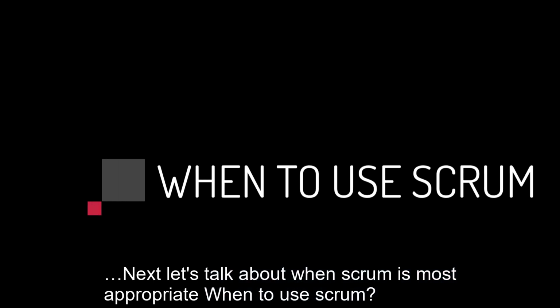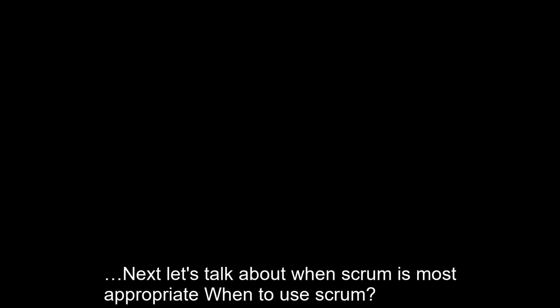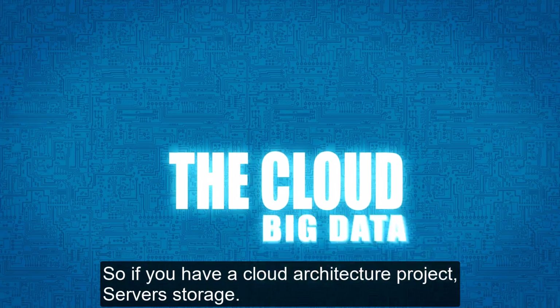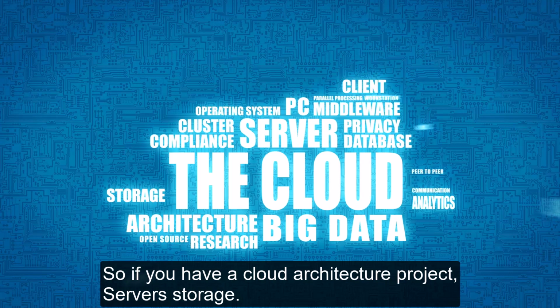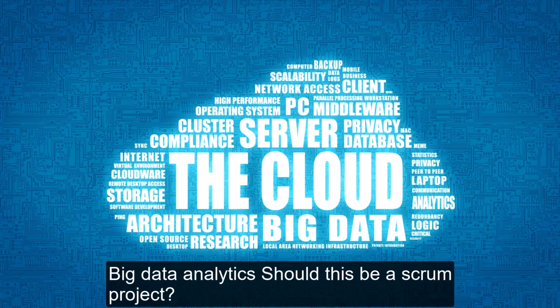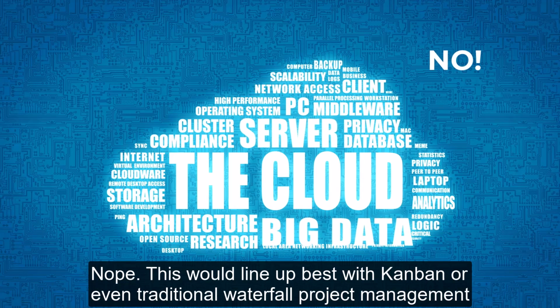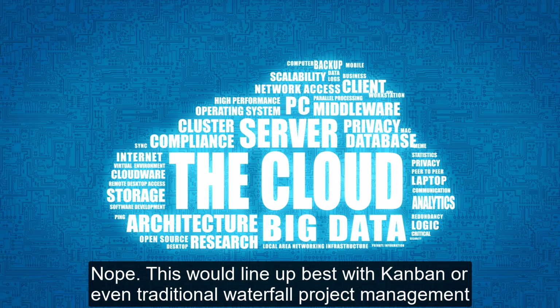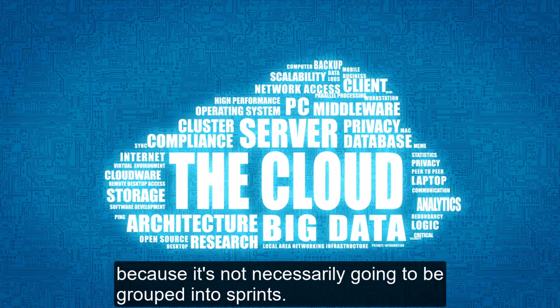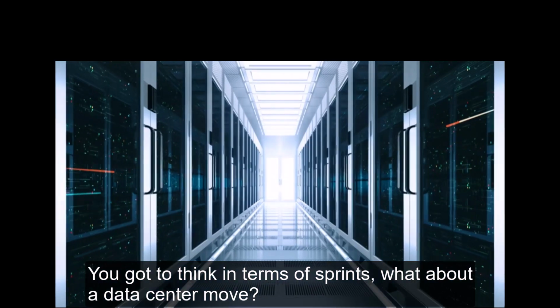Next, let's talk about when Scrum is most appropriate, when to use Scrum. So if you have a cloud architecture project, servers, storage, big data, analytics, should this be a Scrum project? Nope. This would line up best with Kanban or even traditional waterfall project management, because it's not necessarily going to be grouped into sprints. You got to think in terms of sprints.